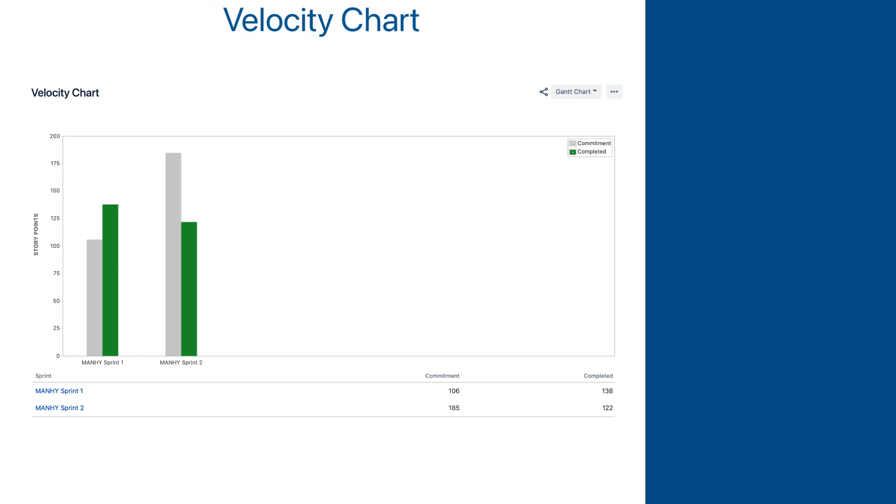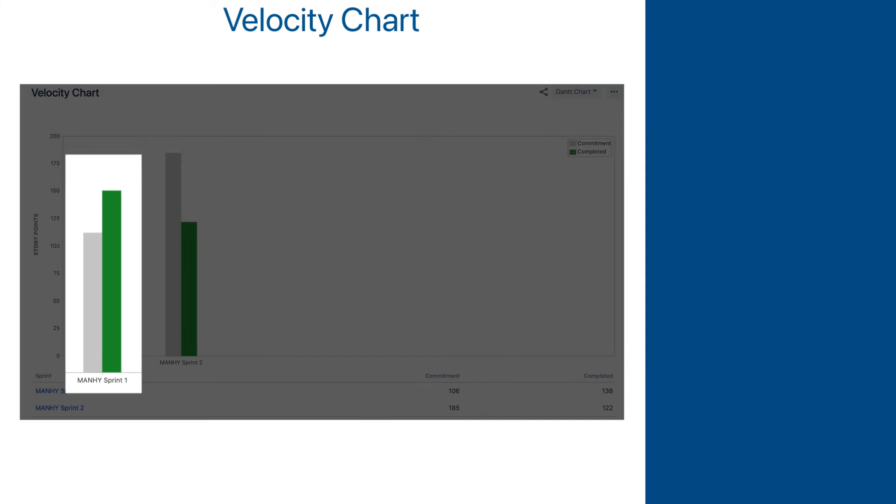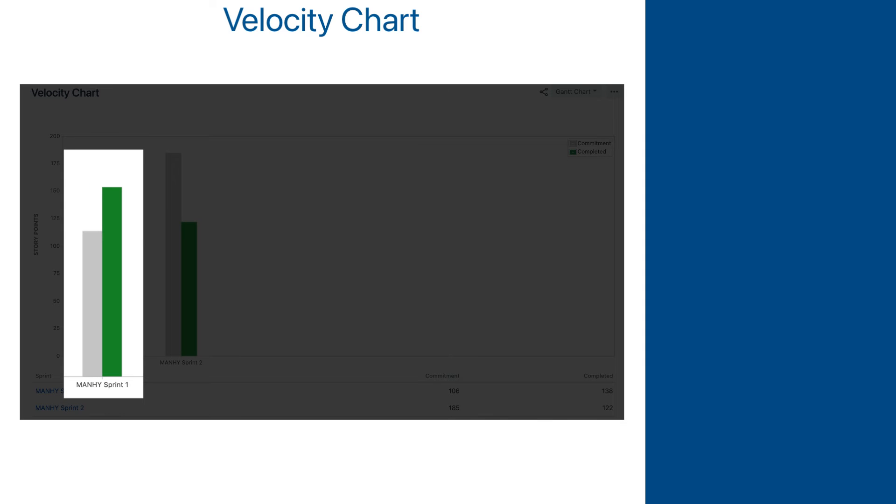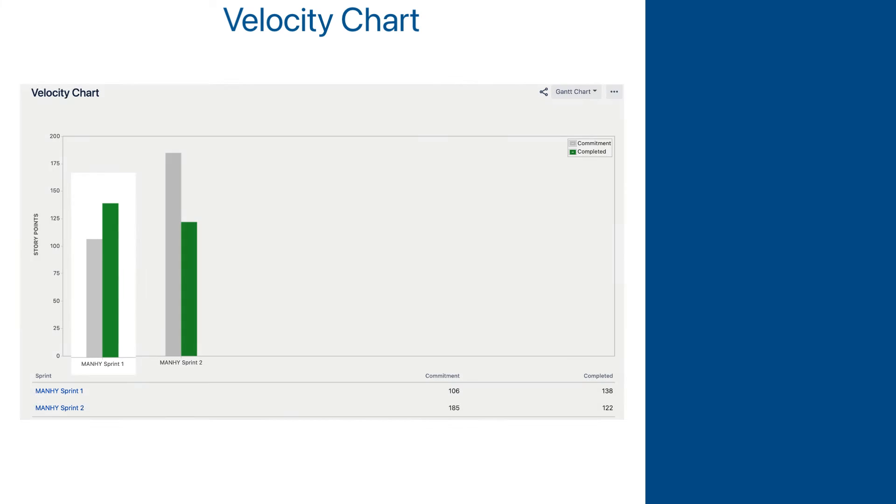So, let's look into something more realistic, an actual project velocity report. We see here that in the first sprint, the team planned to complete 106 points and completed 138 points instead. Obviously, they added work during the sprint, and that means they planned for less than what they actually could do.